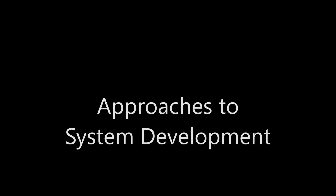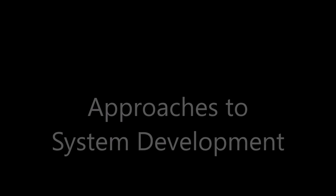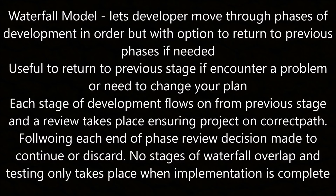Approaches to system development. The waterfall model lets the developer move through the phases of development in order, with the option to return to the previous phase if needed. Each stage of development flows from the previous stage and a review takes place ensuring the project is on the correct path. At the end of each phase, a review decision is made to continue or discard. No stages of the waterfall overlap and testing only takes place when implementation is complete.